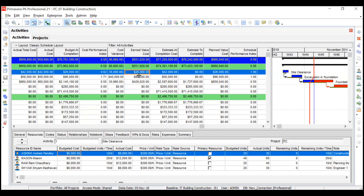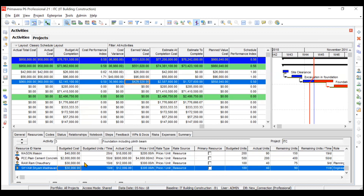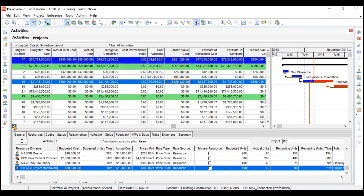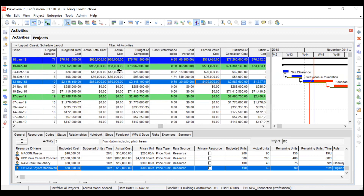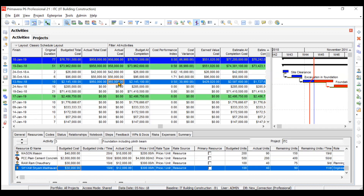Earned Value and Planned Value are the same for the first two activities since both are 100% complete. For the third activity, you multiply the budgeted cost by 20%, giving approximately 4,29,000 dollars as the Earned Value Cost. Actual Cost is straightforward — add up all actual costs from the resources tab to get the actual cost for each activity.